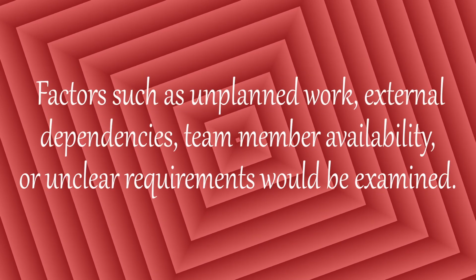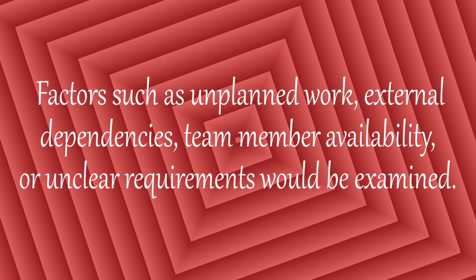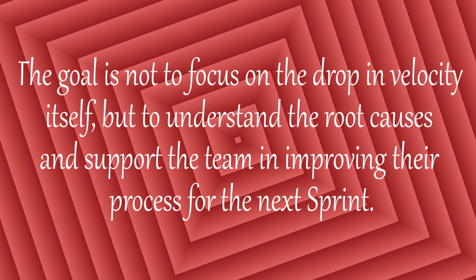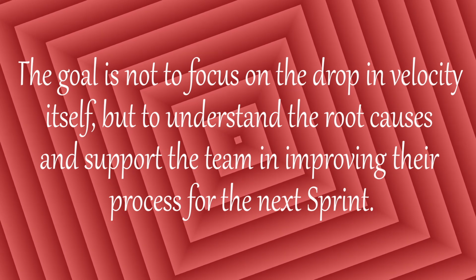Factors such as unplanned work, external dependencies, team member availability, or unclear requirements would be examined. The goal is not to focus on the drop in velocity itself, but to understand the root causes and support the team in improving their process for the next sprint.